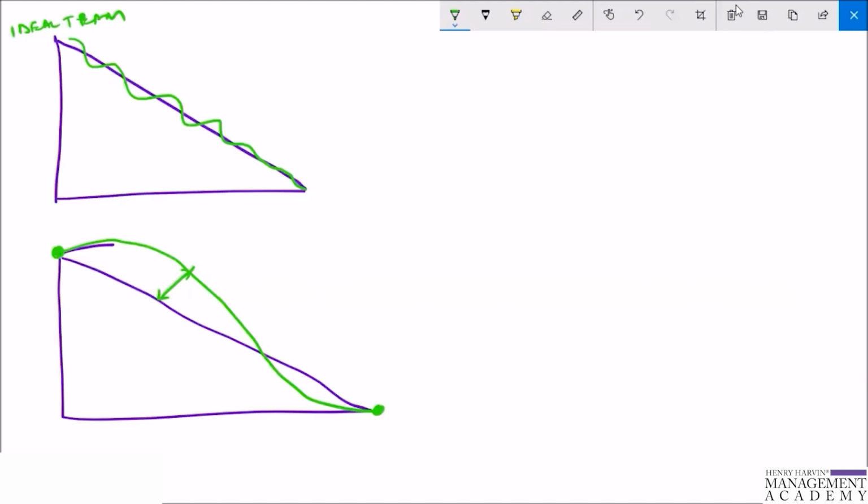Even then they have maintained a good gap in the stories, and at the end there is less work than expected, and even then they have completed the work. So in retrospective, team should discuss the reason for the late progress in the first half of the sprint, which is this one, and the good progress in the second half.